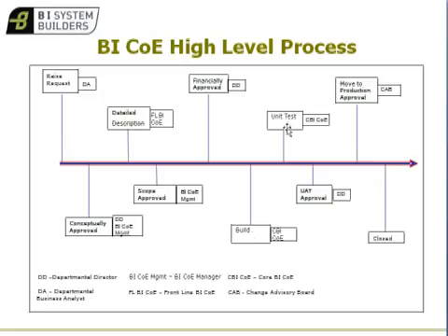Whatever you are building, test it. We know in reality there's lots of different tests, right? Unit tests, regression testing, system testing, quality testing, integration testing, pressure stress volume testing, and UAT. So I'm not showing all of them here. That build goes to UAT approval. It's very, very important. User acceptance testing. The people that raised the request at the beginning need to sit down and test that the COE has delivered what they said they would and what the requirement was.